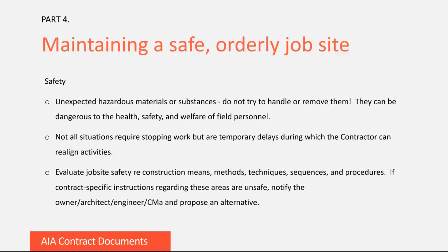Now, not all situations necessarily require stopping the work. Some are temporary delays to the tune of an hour or so. As an example, I worked at a plant where the owner's personnel accidentally released liquid polymer on the floor, which made the surface very slippery for the contractor working in the immediate vicinity. It was also somewhat of a breathing hazard, and there were risks of contamination to skin and eyes. In that case, the contractor lost a few hours of work until the owner cleaned it up.